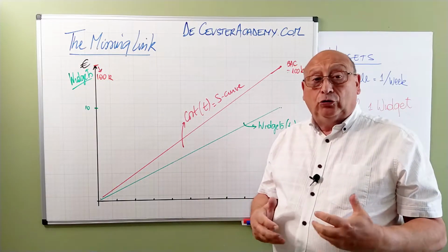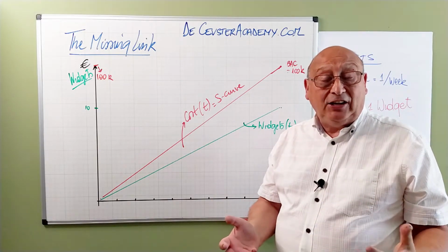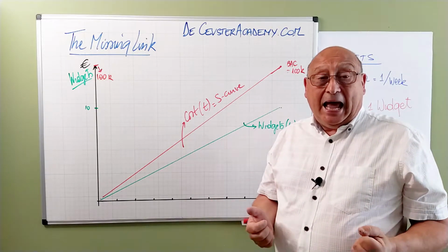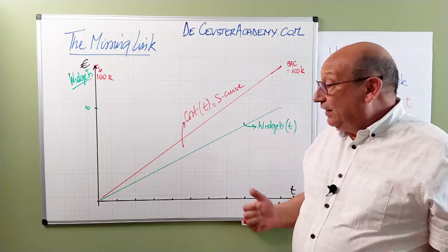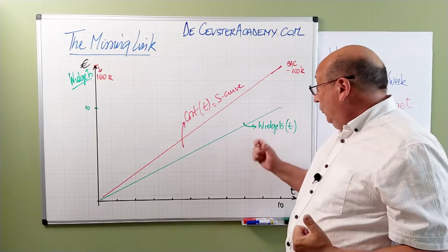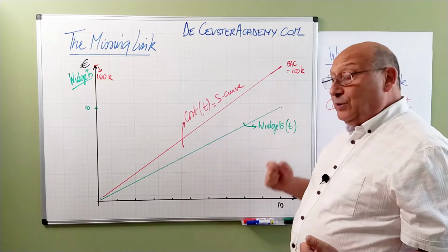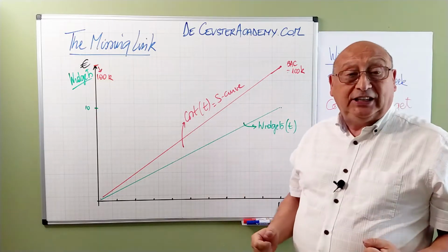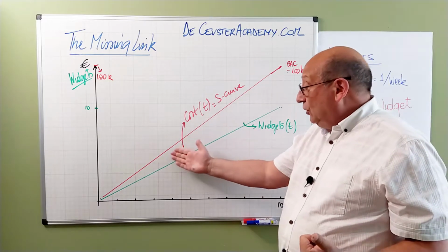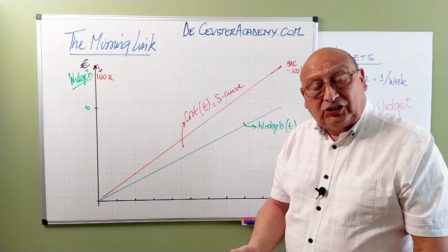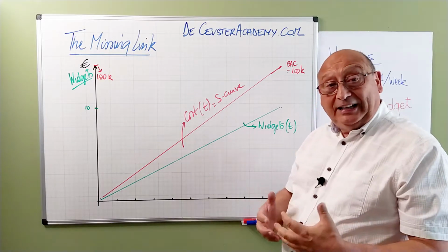The next thing we do, we want to know the cost of our project, so we multiply the quantity of the widgets that we are creating with the cost to create one widget. And in our example here, I said 10K per widget. These are expensive widgets, I know, but we have 10K. Now, what we do is multiply the number of widgets over time with the cost of one widget. At the end here, we create 10 widgets, and the cost of those 10 widgets will be 100K, which is the budget at completion. And we express the schedule information, the schedule baseline, the timing during which we create those widgets, as a cost.